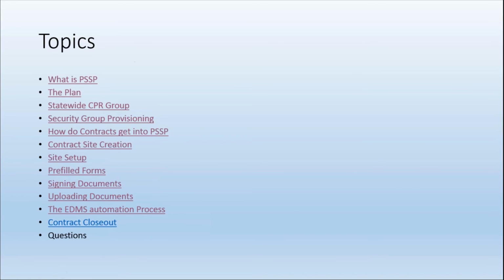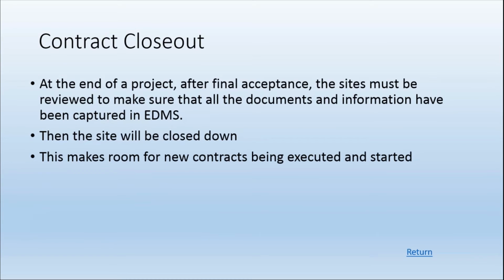Okay, what happens when the project's completely done and you're ready to go do another project? Well, while a project's being built, everything resides in Project Solve, and all of the documents have been shipped over to EDMS, so the documents are in two places. When the contract is finally accepted, we go back to the project site and check to make sure all the documents have gone to EDMS and there's no outstanding issues there.